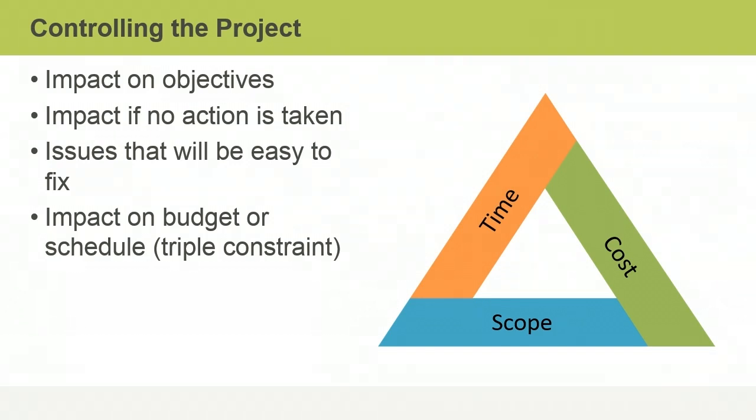You must regularly confirm that you're performing to the baselines that were created in planning. If you do spot variances, it's important to determine the root cause and realign the project to the plan as quickly as possible. If you find that you do need to introduce change to the project, you can do so, but it should be done using formal change control procedures.